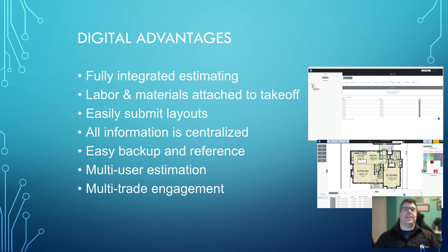Advantages of digital estimating. Fully integrated. This is a massive advantage to digital estimating. Everything is there for you. So you've got your labor units, you've got your pricing units, all pre-populated in the database so that all the calculations are automated. And this is probably one of the most massive time savers. Over pen and paper, you're talking like a 300% reduction in time on an estimate. And that's just the industry benchmark for going from pen and paper into digital.